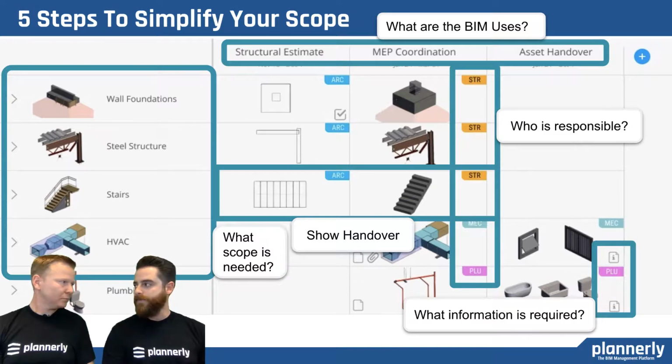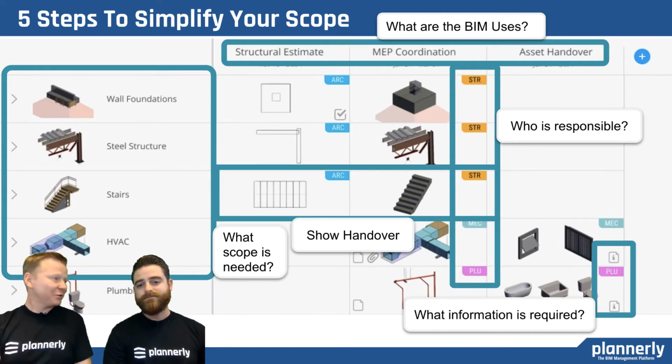But when they sat down with them and actually asked them what information is important for some specific elements, they ended up having a 45-minute conversation on the exact scope that they needed, and they started saving hours of time in all of their future projects because they minimized it to 17 parameters, and instead of thousands, to only a few dozen equipment that they were really interested in having at the handover anyway. But suddenly everybody understands the scope, not just of their own, but also of all of the parties that they're working with. It's an incredibly powerful moment.